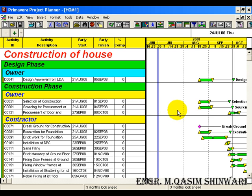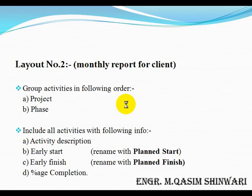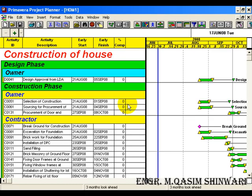So in this way you can customize your layouts. That was our first layout. Now coming to the second layout — in our second layout we are going to group the activities in the order of project and phase only, while we will be having columns of activity description, early start, early finish, and percentage completion. But early start will be renamed as 'Planned Start' and early finish will be renamed as 'Planned Finish'. So let's start.